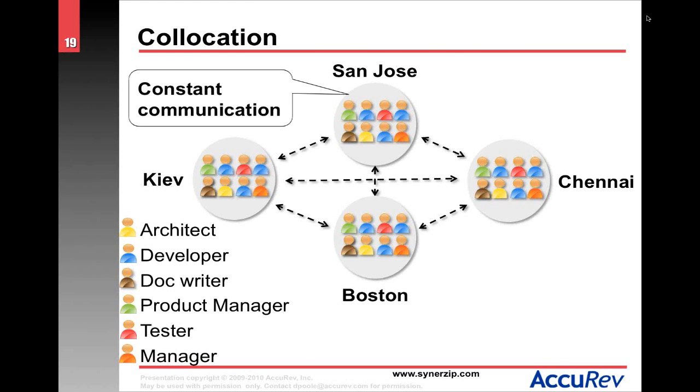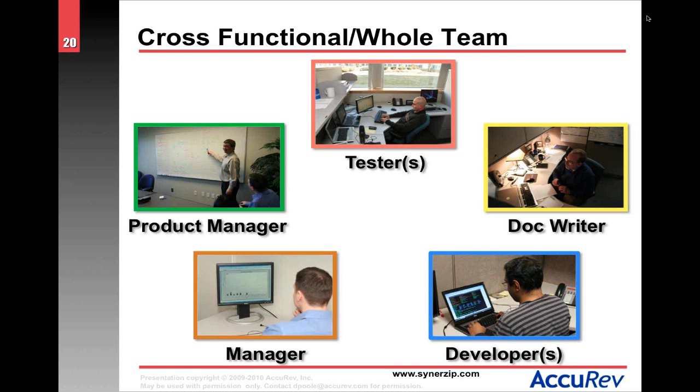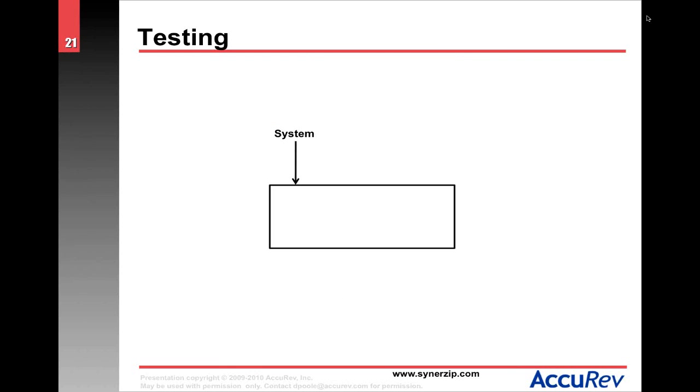Cross-functional team is that we're going to put all of the individuals required for an individual project. Now, this would be 7 individuals plus or minus 2, so a very small team, not teams of teams. Right, so you want to parcel out projects to the team where you have all of the skills necessary for that team to be successful, and they will sit near each other. Thus, much like one-piece flow or a whole team.